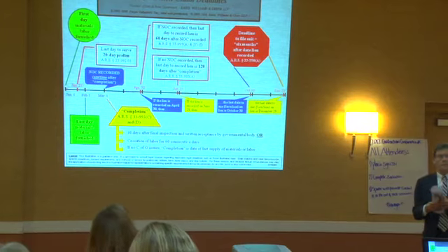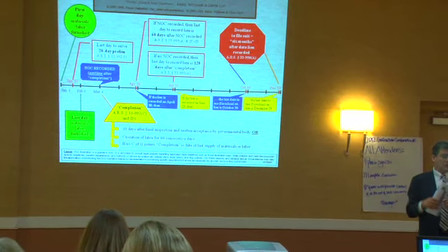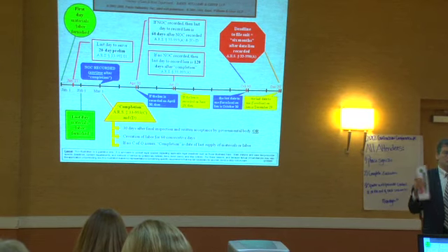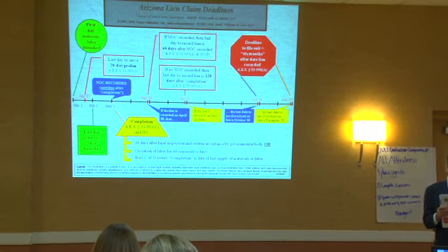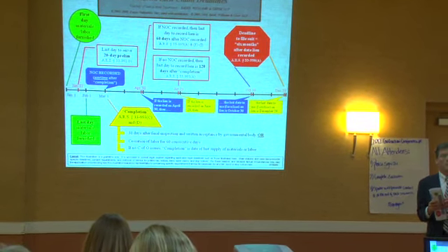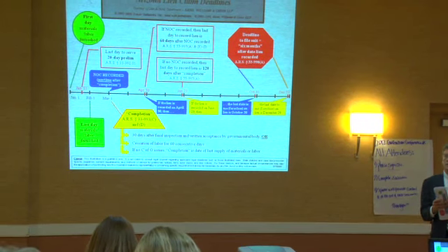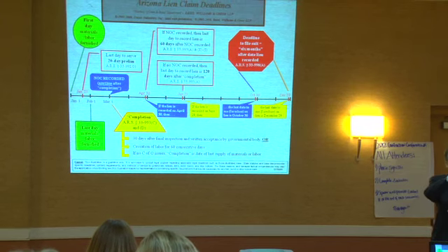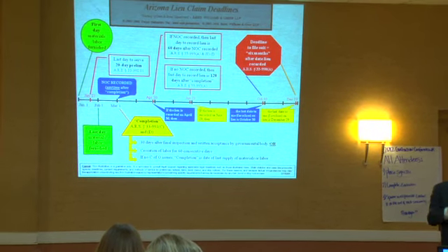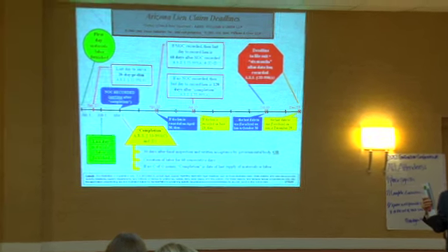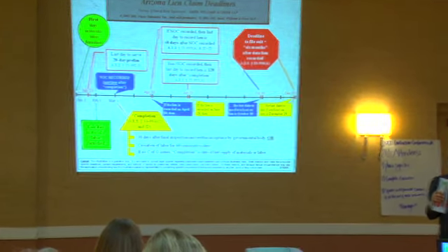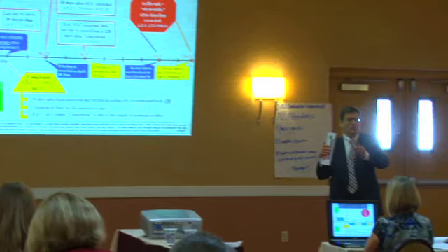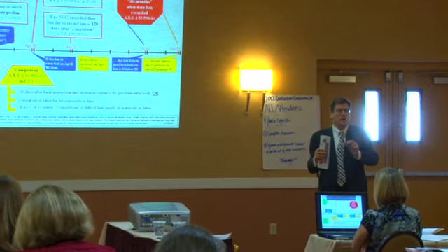Well, you should check your own records, honestly, because if they haven't served it on you, it doesn't matter. Now, you can look it up on the county recorder's website by looking up the owner name, because the owner is the entity who's actually going to record that. Even the general contractor may prepare it for the recorder, but you can search in the grantor-grantee index and just type in the name as you know it of the owner, and that notice of completion should come up.